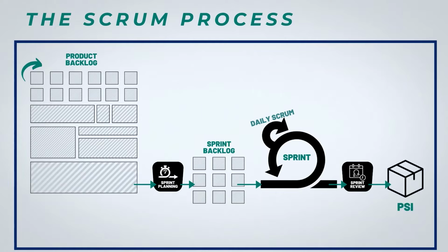The collection of done items are now ready to be potentially made available to stakeholders. I like to think of the done items as being put in a box and taped shut. Since the items are done, the team's job is done, and they move on to the sprint retrospective. The feedback from stakeholders received during the sprint review is incorporated into the product backlog by the product owner.